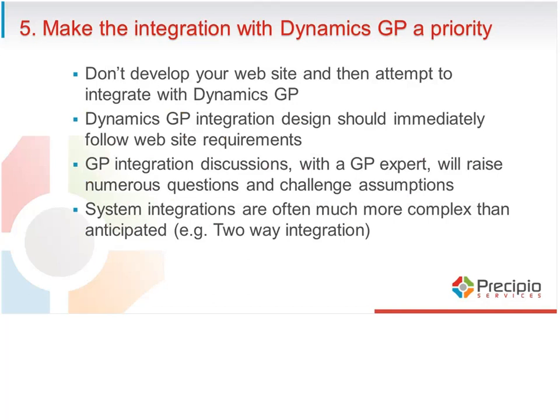So I'd recommend that you develop your website. I would not recommend developing your website and then attempting to integrate with GP later. Make sure that your GP integration design is part of your website requirements or it immediately follows the design of your website. As I mentioned previously, include your GP expert in the discussions, including the integrations. They will likely raise some questions and challenge certain assumptions about how data is going to be passed, how transactions are going to be processed.